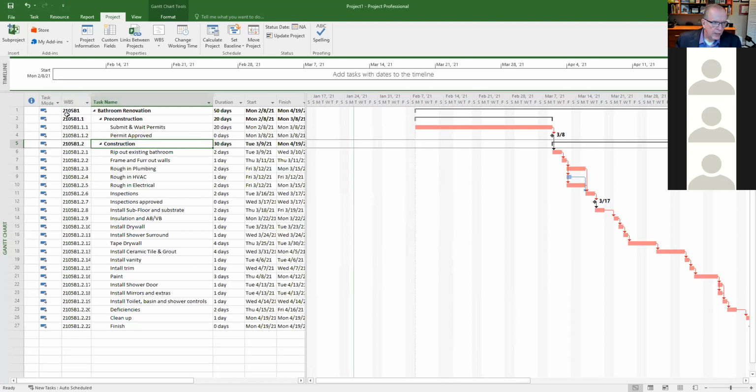So this is 2021, so you know the year this project is in. This is project number 5. It's a bathroom. So maybe you have some sort of renovation contractor. You've got B for bathroom, K for kitchen, maybe C for cellar, whatever coding system you're using. Then you know the type of project it is, and then it's got the coding after that.